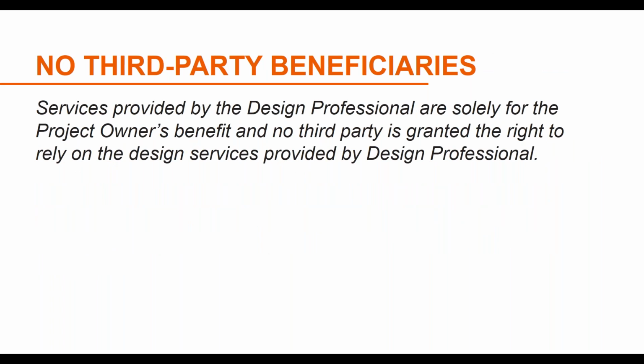Standard contracts state that there are no third-party beneficiaries, but clients often want the lender or others to have the right to enforce the contract against the design professional. So holding on to the no third-party beneficiaries standard is a valuable way of limiting exposure. Even with this prohibition, a design firm can be the target of non-contractual parties who can argue detrimental reliance on the services provided by the design firm.